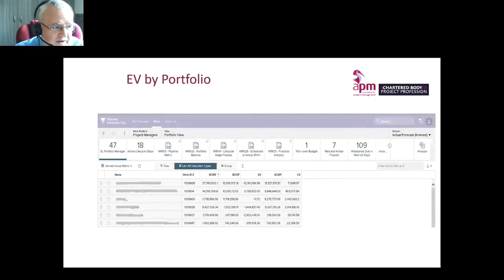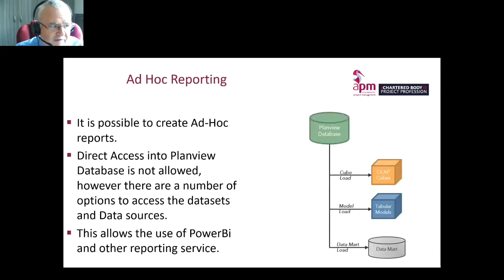So earned value reporting, again, you can do it by portfolio rather than just by project. And in terms of getting the data from Planview into other systems, what we could do, if we wanted to, is use Power BI or even Excel, but we tried to discourage people from using Excel because they would just fall back into using the way they used it previously. So it is possible to create things like OLAP data cubes, a data mart, which you can then use with either Planview to interrogate and Power BI, or you can use ClickView or Excel or anything else.